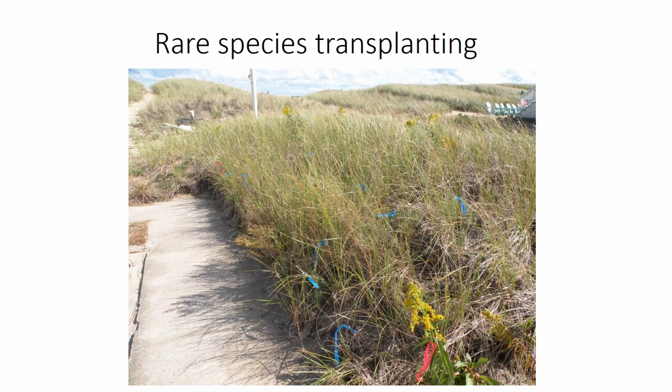Next slide. This is the actual impact area where we had field wormwood, a rare species. So we had to flag each species. Then we had to actually do the transplant of each species. We had to have a watering plan. All of this had to be worked out with Amy Lamb as part of the permitting process.